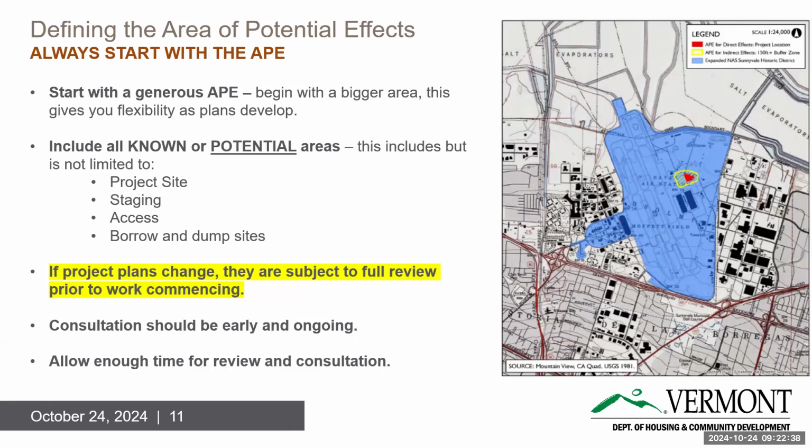The project that resulted in this training, the access was not included initially in the reviews, and then it changed over the course of the project. And potential archaeological sites significant to Native Americans were impacted. And borrowing and dumping sites also should factor into the APE.